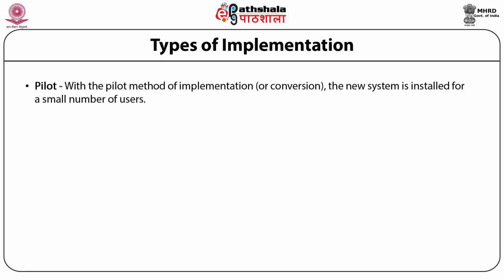With the pilot method of implementation or conversion, the new system is installed for a small number of users. When they learn, use and evaluate the new system, and it is deemed to be performing correctly, the system is installed and used by all.